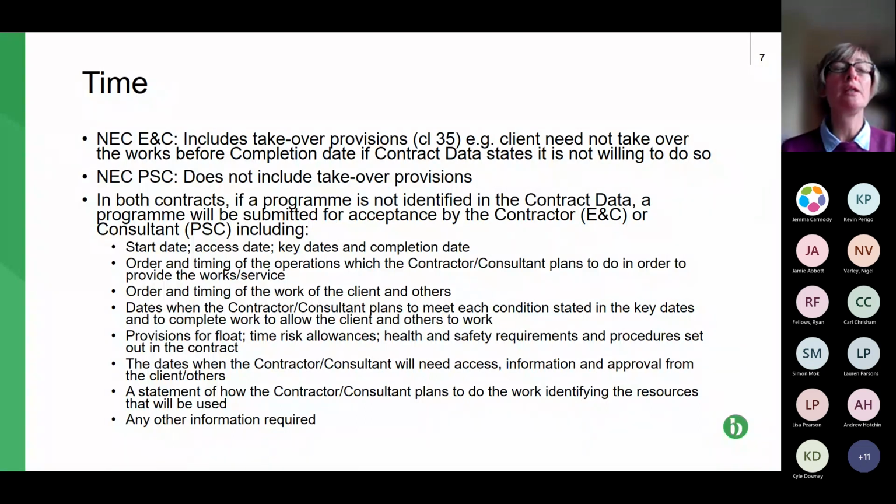And of course, bear in mind that if the consultant is submitting a claim which you as contractor would want to submit up the chain, so circumstances where the client hasn't done something that they should have done, for example, which has caused a delay, then obviously you are going to need to establish that. So it'll be a compensation event, but you're going to have to establish it by reference to your approved programme, which is why you need that detail from the consultant in your programme. So it's kind of a circular thing, really.